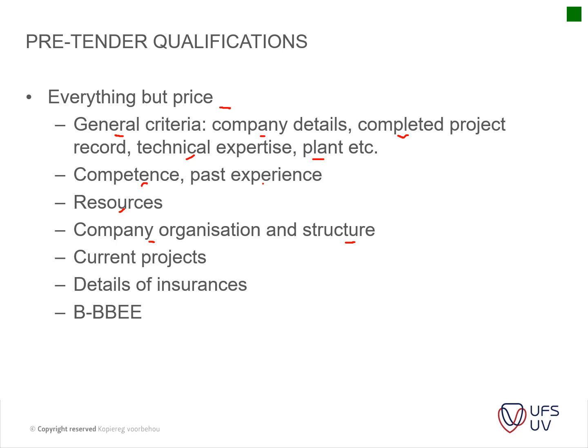And then in many tender documents, your current commitments are also asked for. So sometimes it might be neck and neck between you and another company, but it might be a situation where you are a bit overcommitted at this stage, so you might not be able to do the work in the next few months. Then it would be better for the client to rather give it to someone that doesn't have that much work. This is usually a difficult thing